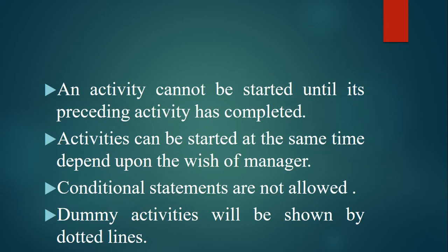An activity cannot be started until its preceding activity has completed. Activities can be started at the same time, depending on the wish of the manager. It depends upon the policy and the wish of the manager whether a few activities should be started at the same time or started one by one. Conditional statements like if-then are not allowed in any situation.